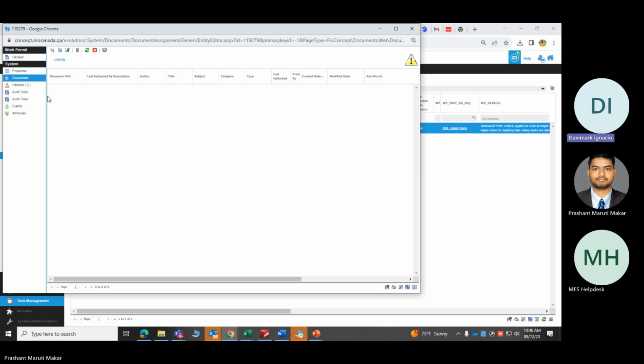Okay. So for the quotation, it should be step by step. There are cases where the task is currently in approval stage, and they have uploaded the documents, and then it will go back again to the first level. That means we have lost some time. Also the client will get frustrated that we have to approve it again, twice, thrice. Also there are some cases where the quotation is already approved, and you need to complete the task.